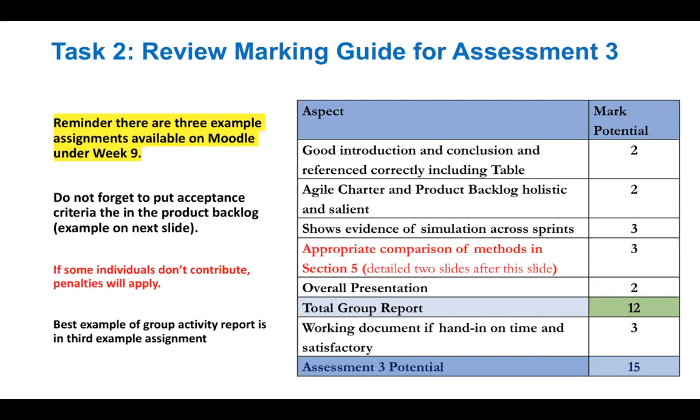One thing that is really, really important: you cannot put together a product backlog without acceptance criteria. If you have a feature, how are we going to verify that a particular feature was actually delivered? Without ensuring that the feature has been delivered, we are going to have a problem in relation to that item.